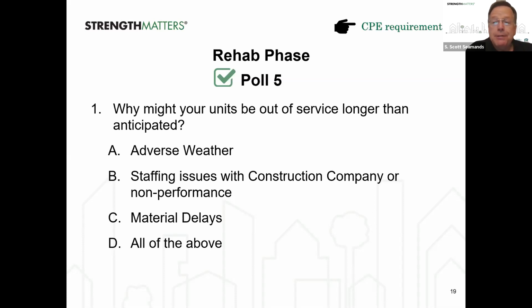But there's only so much of the developer fee that you can defer. And at some point, if the interest is so far beyond what you budgeted, it's even more than your developer fee was going to be, you have to defer 100% of your developer fee, and that's still not enough to cover all of these cost overruns. So, the unfortunate result was that developer went out of business. Those properties were handed off to someone else, and years later finished, but the developer itself ceased to exist as a result of that. So that's a pretty tragic result, but a real world situation.